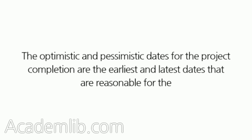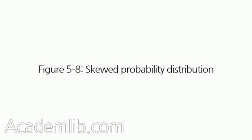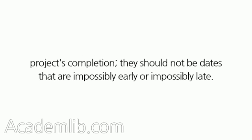The optimistic and pessimistic dates for the project completion are the earliest and latest dates that are reasonable for the project's completion. They should not be dates that are impossibly early or impossibly late.